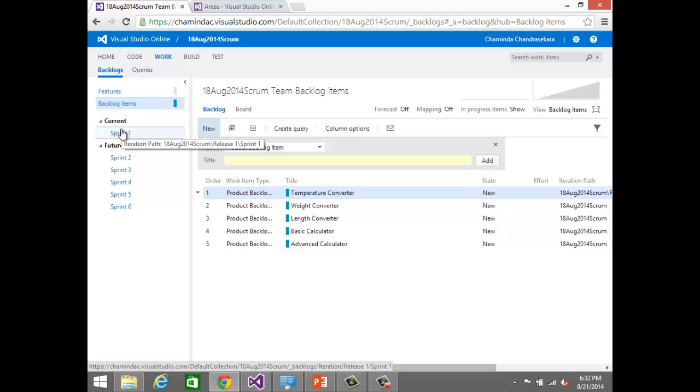Okay. It's working like this in TFS, right? In TFS terminology, that kind of task is called a blocked task. So what you should do is change it to blocked, and maybe raise an issue or impediment saying this impediment should be cleared. That means his task cannot be completed until something is completed. Maybe it can be something that is not a development task.